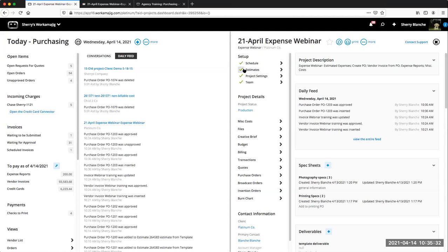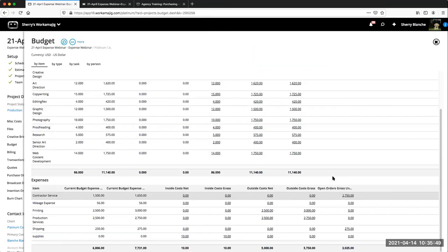Okay, perfect. So we have orders. I tied one to a vendor voucher. If we look back at our budget, we're going to see where we're at budget-wise. We're going to be over because I created an order that wasn't budgeted for. So again, we're going to see what we actually estimated and what amounts we've brought in, by type, by whatever detail it might be.